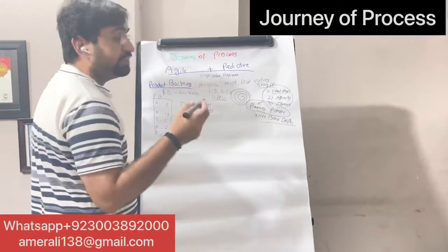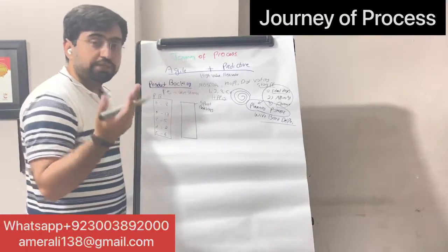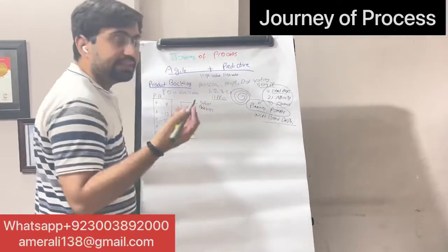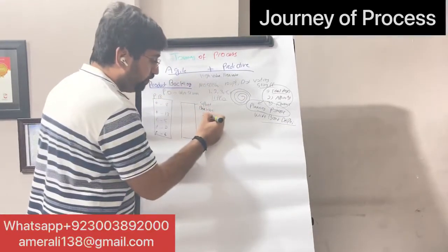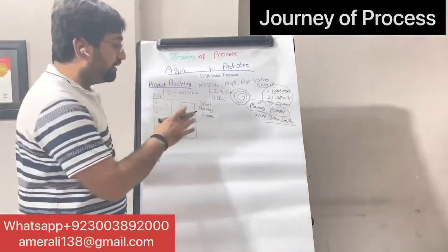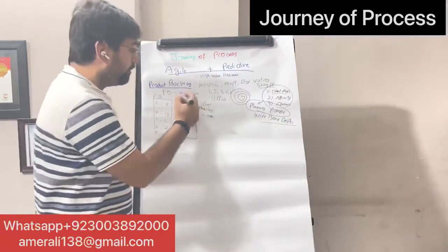So a sprint is basically a duration that can be 1 to 4 weeks. Normally it's 2 weeks. We decide in the start and we take the same time. Let's say we have a 2-week sprint. The development team and the Scrum Master, again acting as a facilitator, are in the sprint planning meeting.